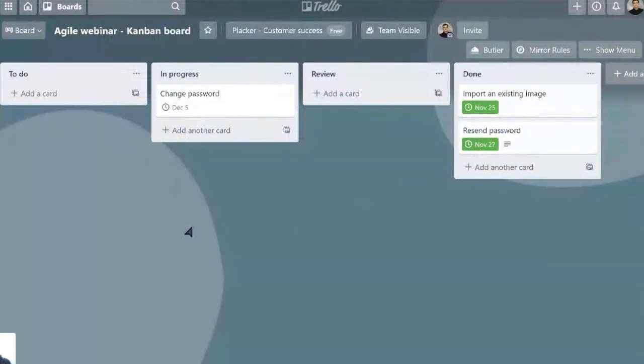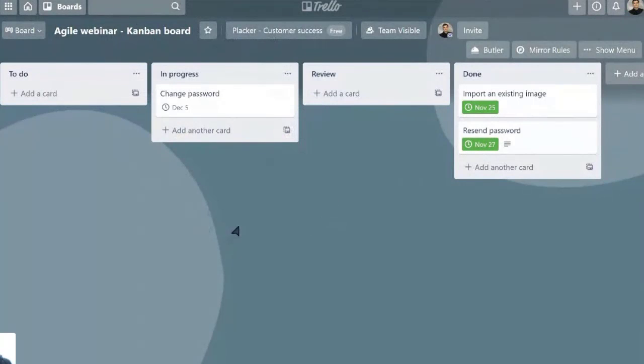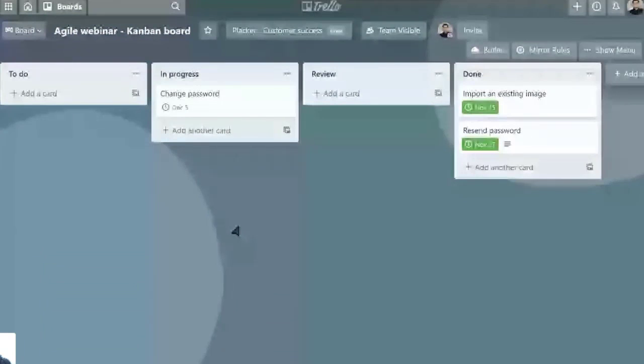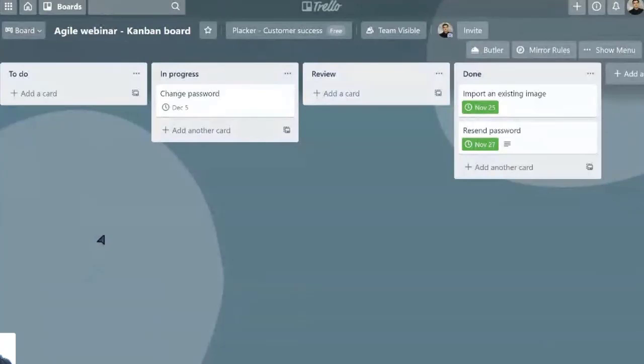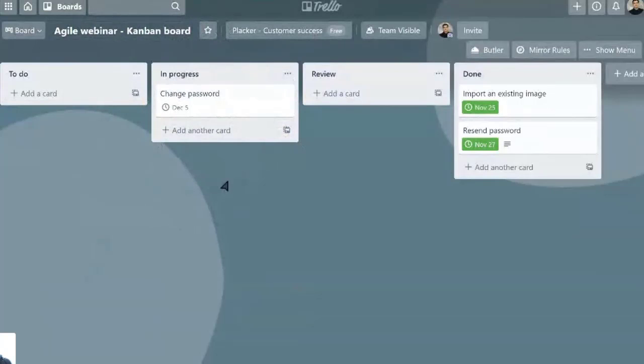So it's a suggestion that you limit this work in progress. You can, if you're working on a team and you want this to be very clear for them, you can even establish a number. So if your team has 15 cards that they are working on, you can say that you cannot have more than five cards in the in progress column. Otherwise, it would be unproductive.